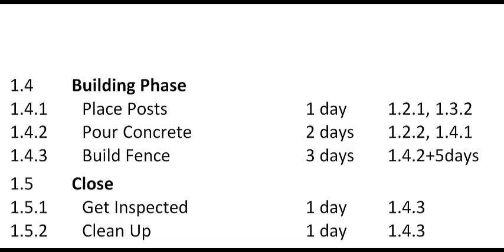Place posts is dependent on those two tasks. You can also see that build fence 1.4.3 is dependent on task 1.4.2, and it also designates the 5-day lag.